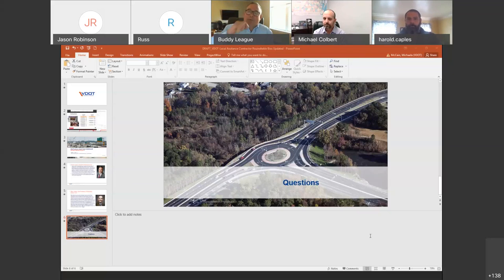One question that came up, specifically around utility relocations and delays, is: after what point does a contractor consider filing a claim? I think that is a huge issue for us to talk about, and to get an understanding from both sides on why we have claims and what prompts a claim. The first point I'll make is that when we have something, whether it's a utility relocation that causes a delay, we have a certain amount of time to notify the locality of our intent to file a claim.